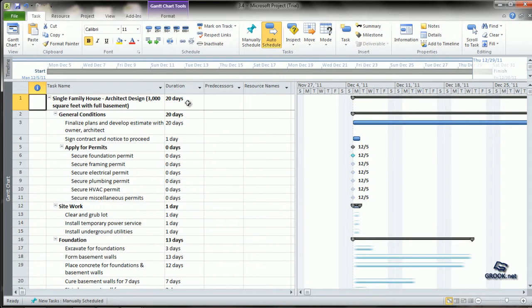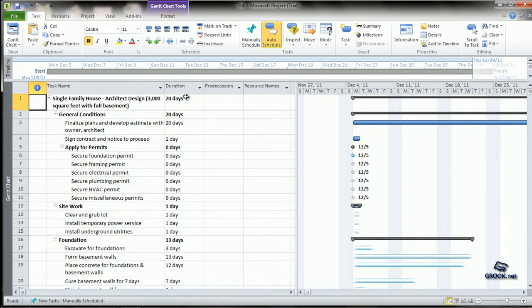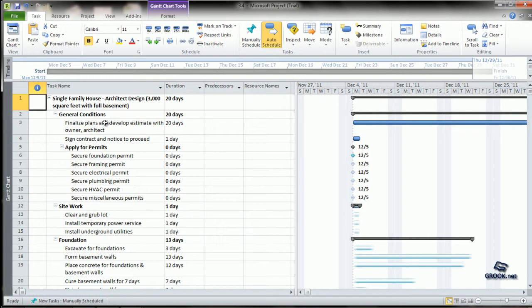When you look at the durations, you will see that the maximum duration from the subtasks have been taken for the summary task. This is because we have not yet scheduled the project. Once we schedule the project, you will realize that the duration for each of the summary tasks is the total duration for the subtasks.